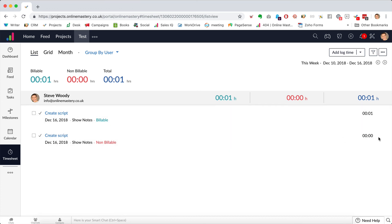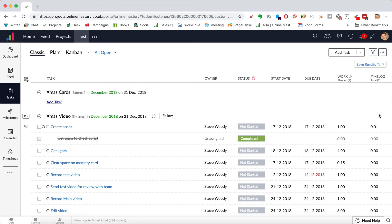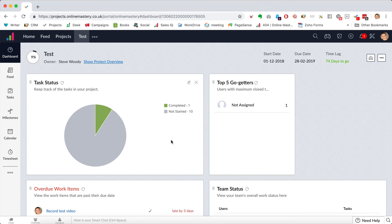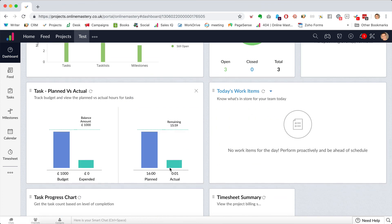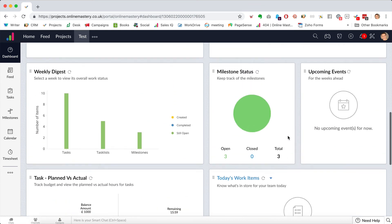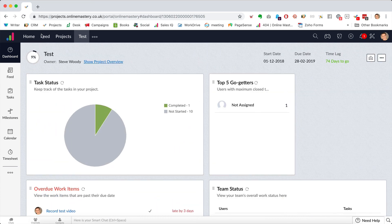Clicking the time log, I can see we've spent a minute on this task, and back on the dashboard I can see one thing completed and how much time was planned versus actually expended. This is what I use across all of my projects. From the home view I get a dashboard of my entire business. Once a week I take a screenshot and send it to the client so they can see the progress. I hope this helps as an introduction to project management using Zoho Projects.